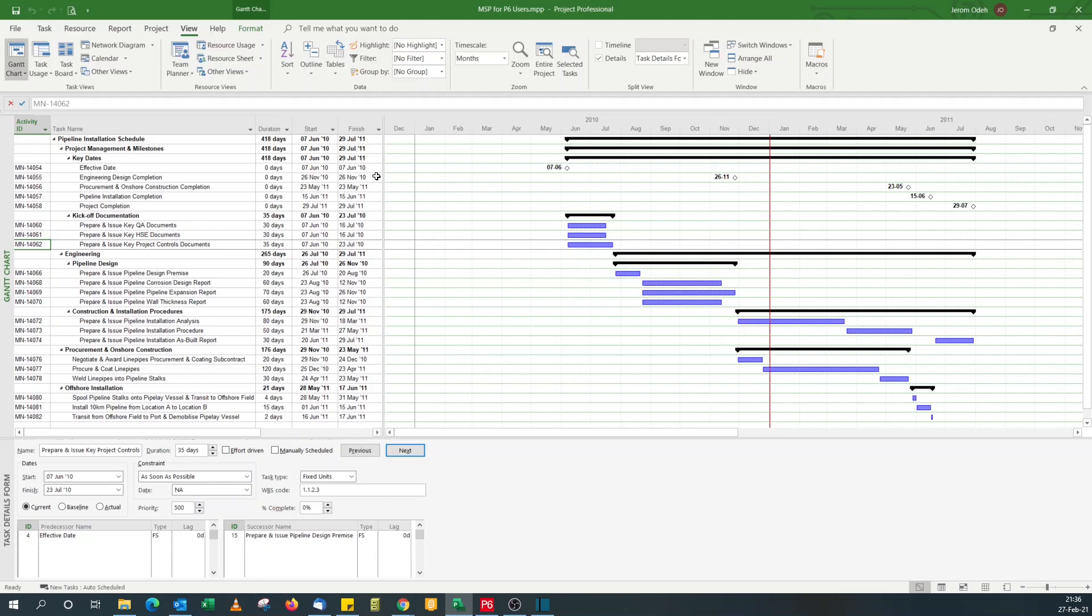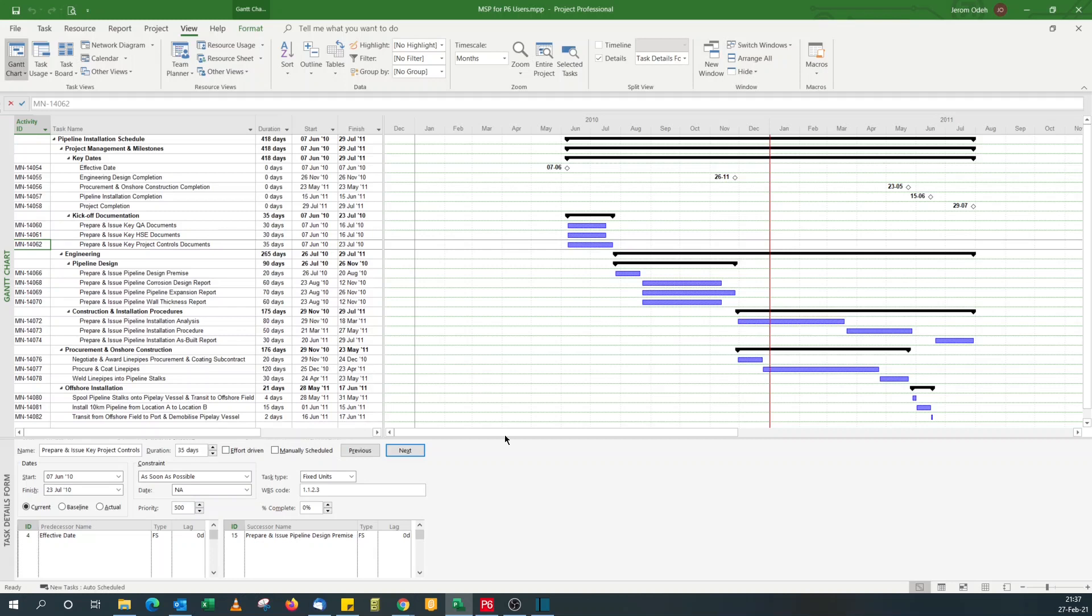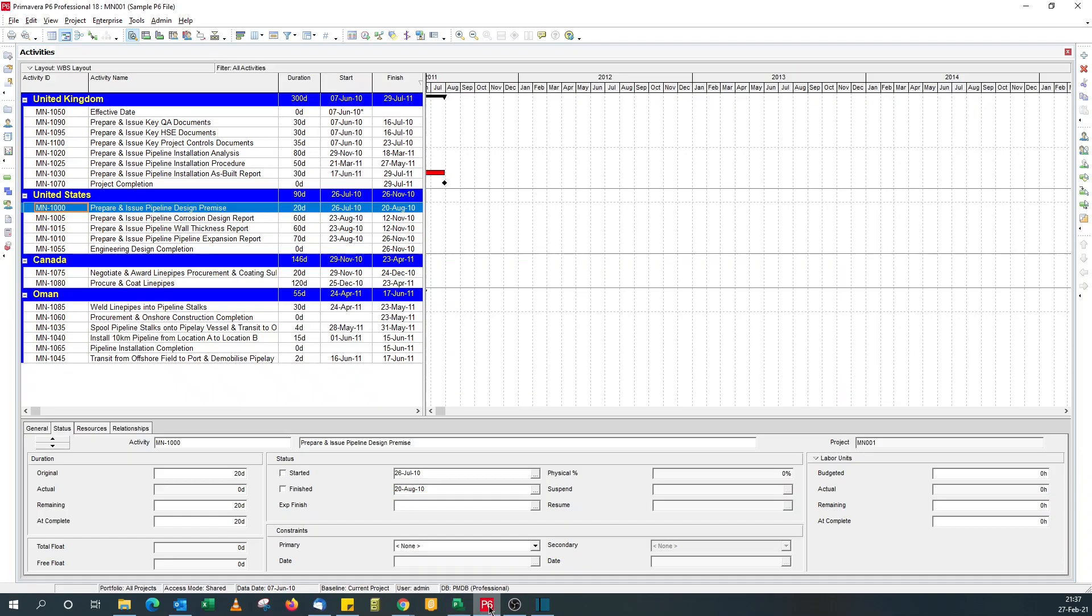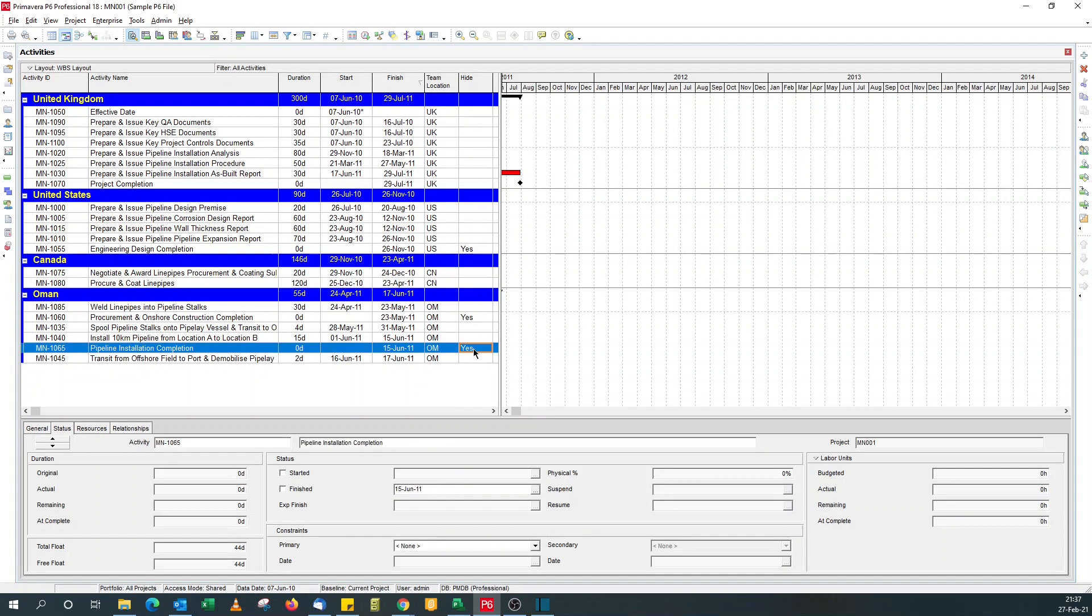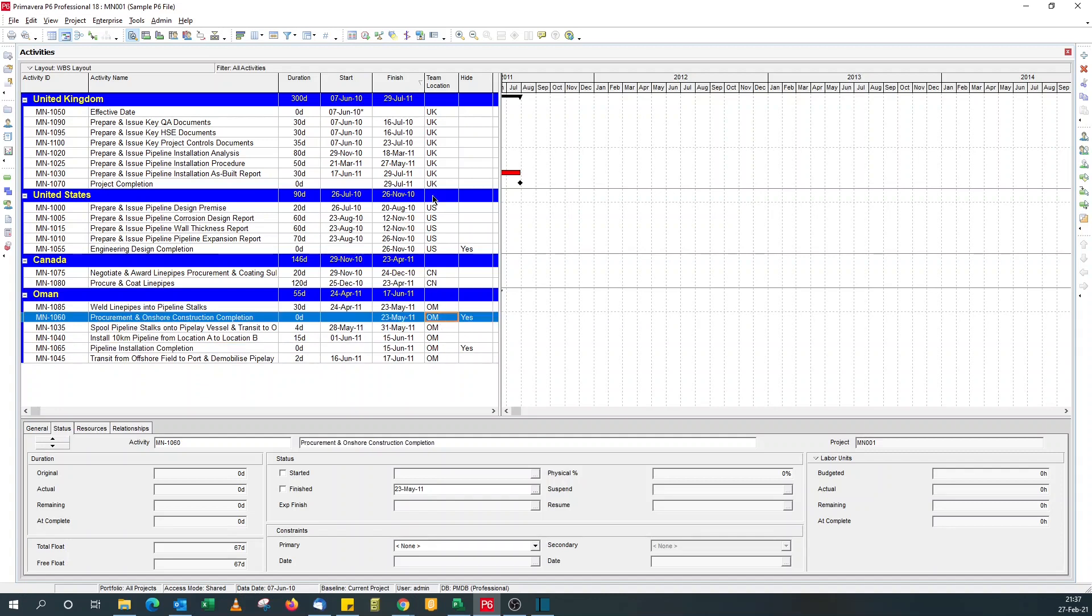For this I'm going to use two sets of custom fields: a text custom field and a flag custom field. A text custom field is good when you have multiple values, more than two values, and you can group and filter with that. A flag custom field is good when you only have two values, a yes or no or true or false. My hide is a yes or no field so I can use a flag there, but the team location has four values so I need a text custom field.